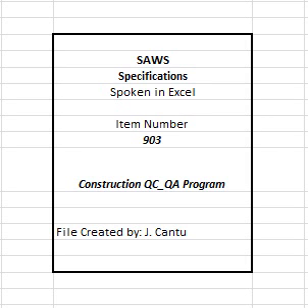G. Preparation of right-of-way. H. Temporary controls, including but not limited to, erosion and sedimentation controls, dust control, construction noise control, etc. I. Surveying. J. Delivery, storage, inspection, and installation of materials and equipment. K. Testing of on-site materials and equipment. L. Manufacturer's field services. M. Training schedule. N. Starting of systems.